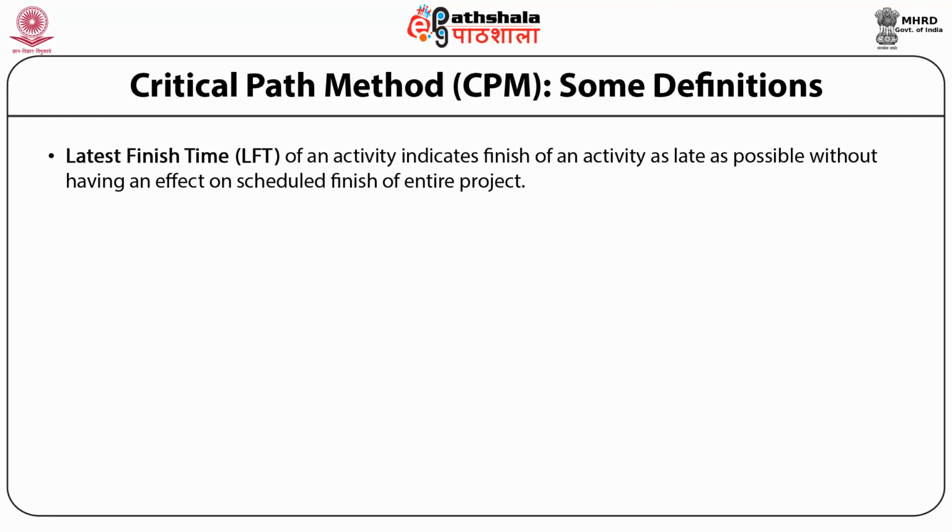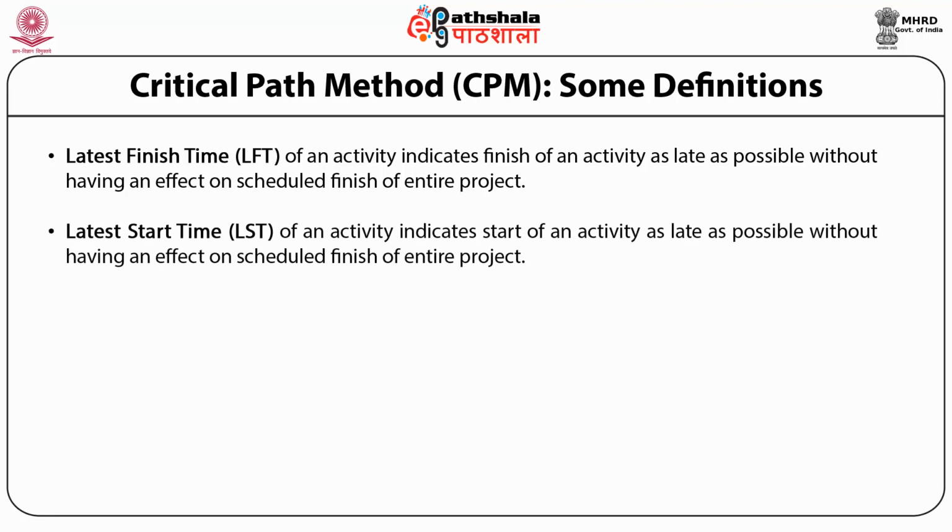Latest finish time (LFT) of an activity indicates the finish of an activity as late as possible without having an effect on the scheduled finish of the entire project. Latest start time (LST) of an activity indicates the start of an activity as late as possible without having an effect on the scheduled finish of the entire project. LST is the difference of LFT and duration of the particular activity.